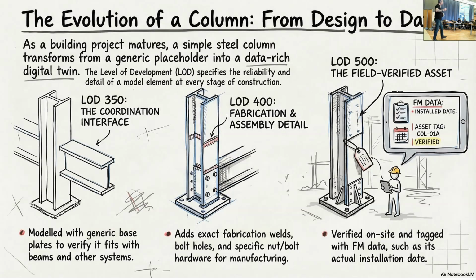When it is manufactured on site, it's going to be manufactured like that. Fabrication is going to be like that. This is 400. Then we have LOD 500. It is manufactured on site, and there are some changes, there are some dates, there are logs. For instance, we want to know how much torque is put onto these bolts. When they torque, I have to tell you this.